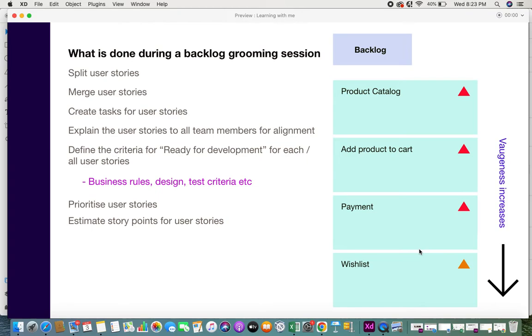Always, before going in for a backlog grooming session, make sure that you communicate or speak to your stakeholders and understand what all their priorities are. Also, you need to find out ahead whether all required team members will be present for the meeting. Organize your thoughts, do a little bit of refining on your end so that you don't get confused during the backlog grooming session.